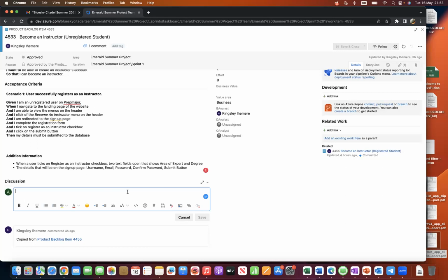They come also to say, oh, there's a new story, a new requirement that the stakeholder wants us to take in. Team, what do you feel? It takes priority over everything we're working on, and the team discuss and collaborate on it. Are we taking it into the sprint? If we're taking it into the sprint, Scrum Master, you need to negotiate with the product owner to say, oh, this is an 8-pointer, 8 story points. If we're taking it in, do we have another 8 story points that need to go out in order for us to accommodate this because of our capacity?